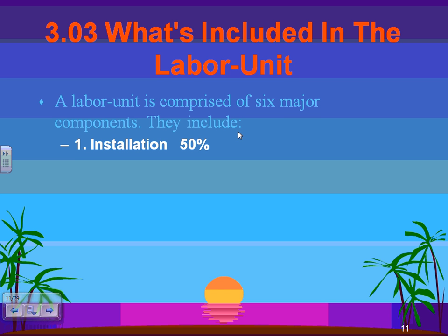Take this. Let's say I have a job with a switchgear, and the switchgear needs 100 hours to install. The unit for this switchgear is E, each. To install it, mount it, orient it, put it in, out of the 100 hours, how many hours do I need? 50 hours is just to install it.